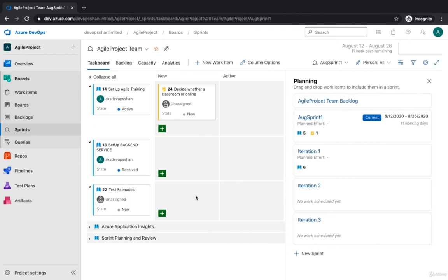Okay, for the next 2 weeks all of us are going to focus on these many stories. Now these stories are basically epics and features which are going to be delivered to the end users, global users, and that's what we work toward. And once the sprint gets over, we sit down along with the same audience and do a retro: what has gone well, what needs to improve, and what's working well.